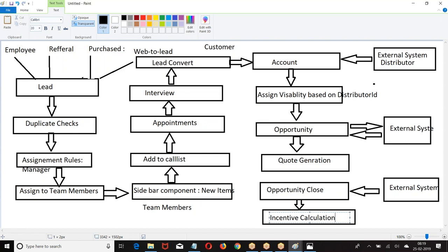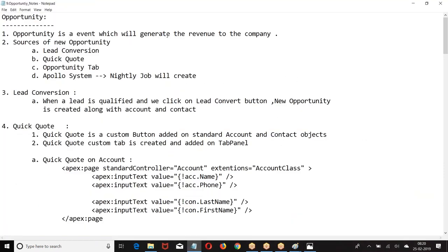For us, a sprint means 4 weeks. So it comes to 60 points. Out of 60, 9 points are left for testing purposes and 51 points are left for development activity. This is the general procedure. Out of 5, you simply calculate; similarly, you calculate on 8.